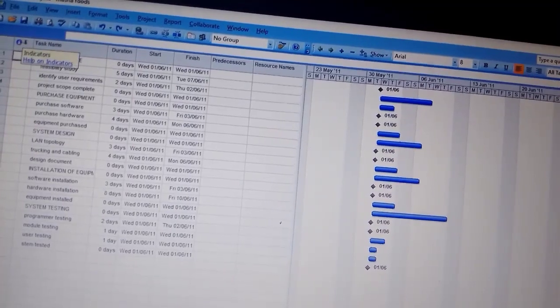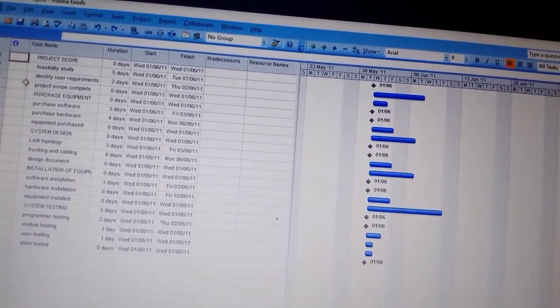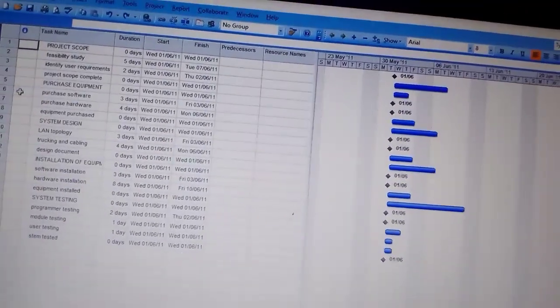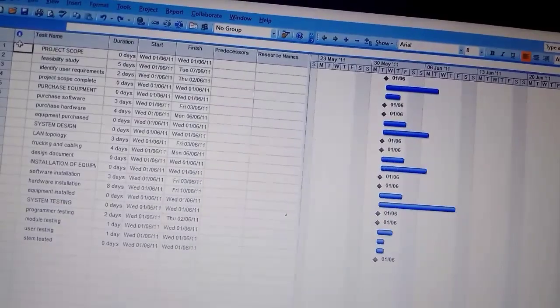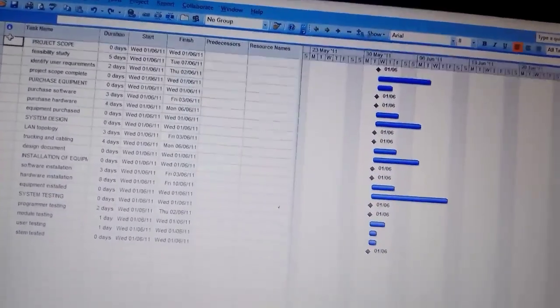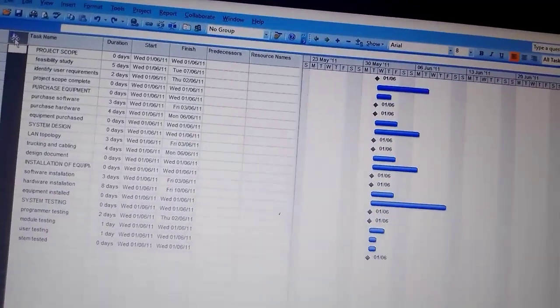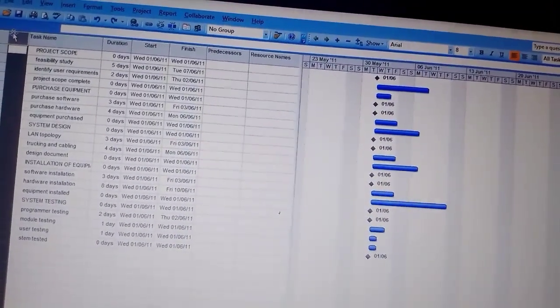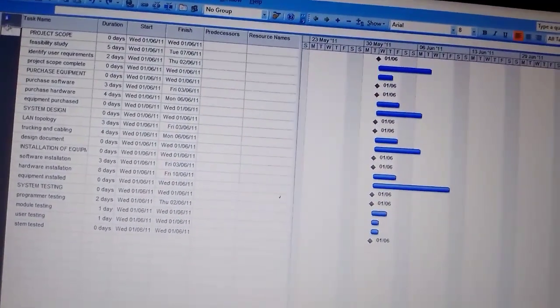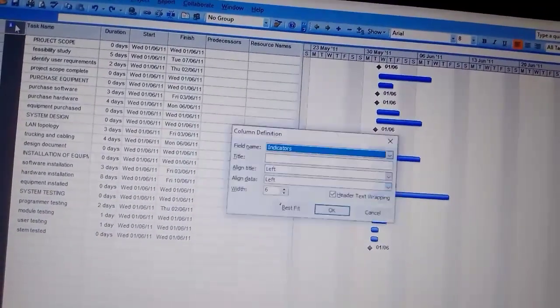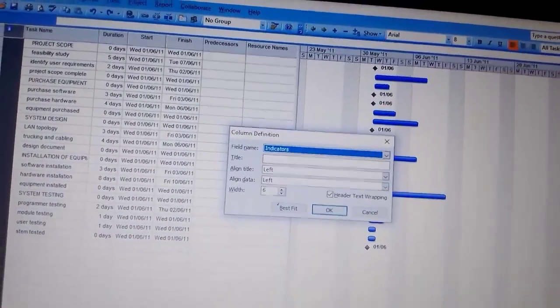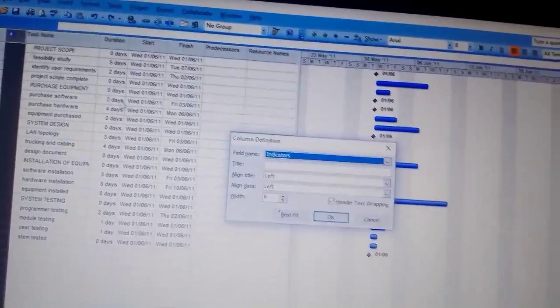As we are linking, we are going to see it. So you come here, we are supposed to create a new column for task number with the ID of WBS. The column is already there. In case it was not there, you right click and then you select insert column. Yeah, so the column is there, we shall just have to name it. You tap on this icon. This I, it's what you tap on.